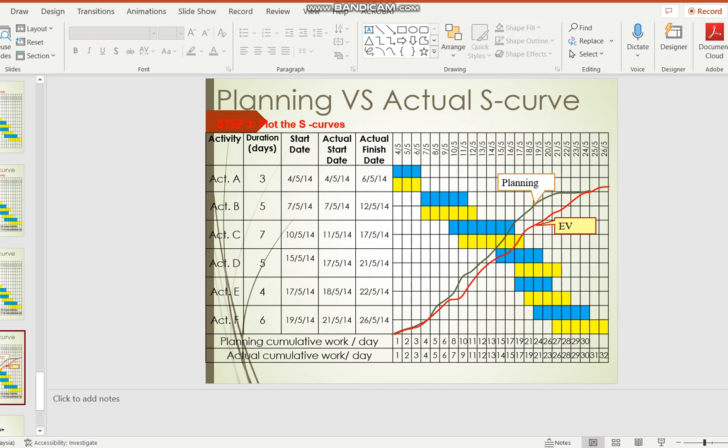And your EV, the earned value, is the actual work progress or your actual work performed. Okay? So when you have your actual work performed, you can just mark it down. Like let's say you put in 5, 5, 5, and this date it is actually 4, for example, 5, 5, 5, 4. So then you plot that line. You need to do exactly the same thing and replot the line up to this point. It's always up to a certain point. EV will grow as the month progresses.